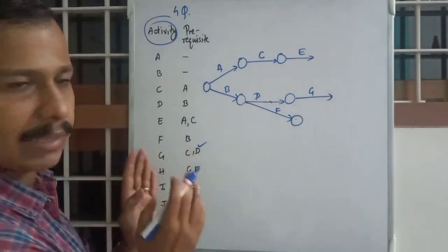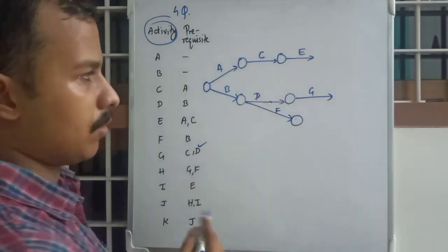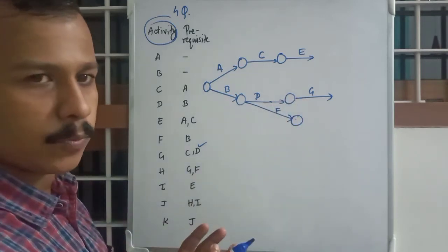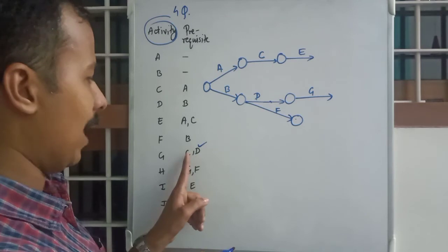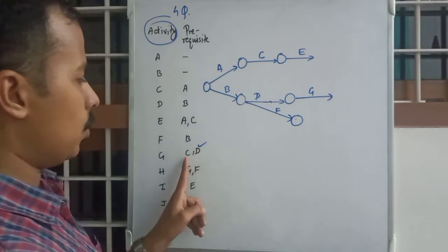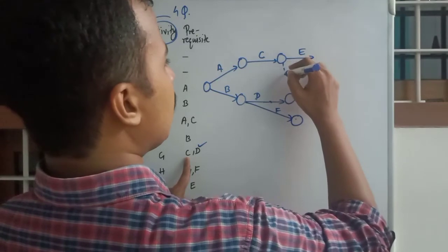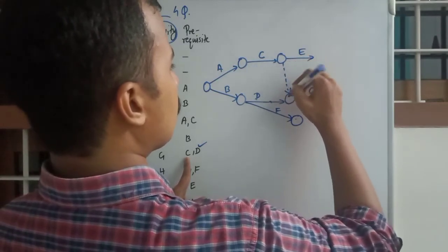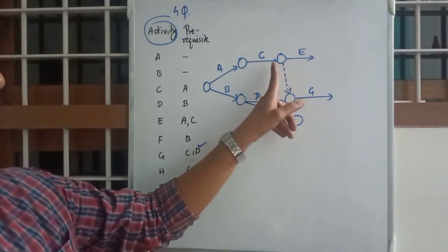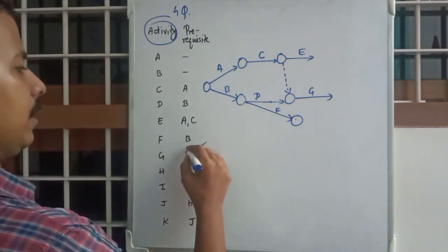So there is no real activity enlisted to connect with C or C with G or C with any activity or this event between D and G. So what do you do? You had two events, two activities as prerequisites for G. D is now complete. Okay, and to include C into that, you use a dummy activity. Now to complete or to start with G, you need to be completing C and D.